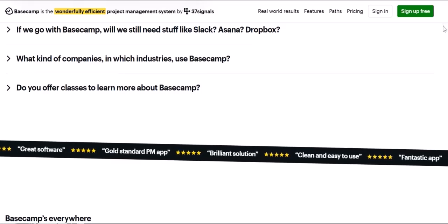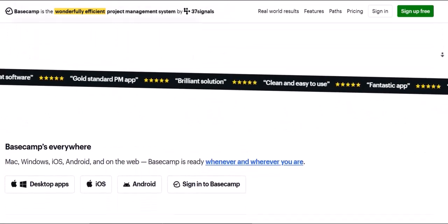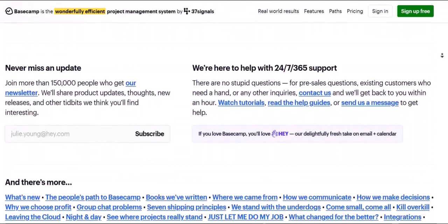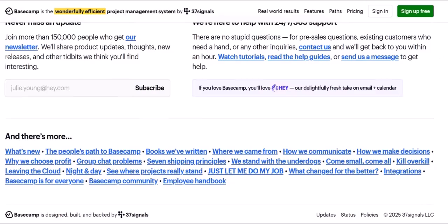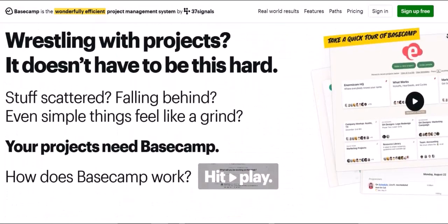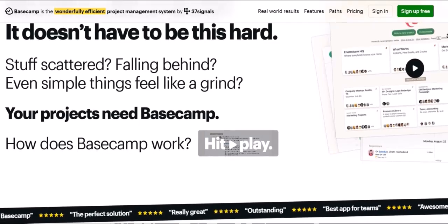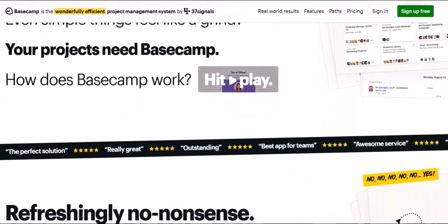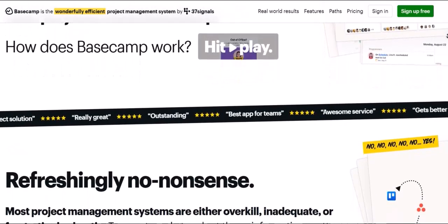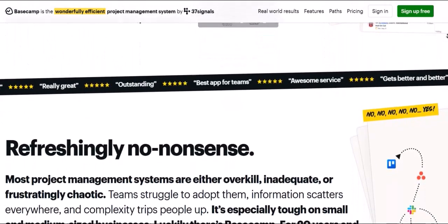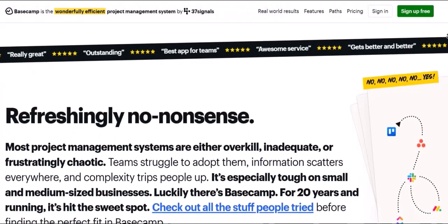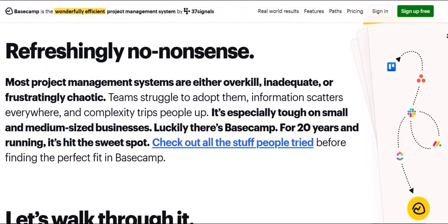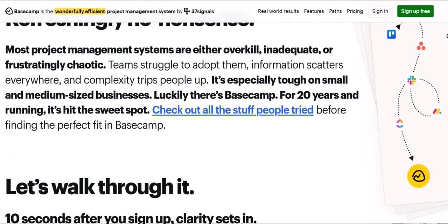Standardize assignments, optional. While you typically won't assign specific people to tasks in a template, as they'll change per project, you can assign roles if your team consistently has them. For example, assign a task to marketing lead instead of Sarah. Review dates. Ensure any dates are relative. Basecamp is smart enough to adjust dates when you create a new project from a template. If a task is due 7 days after project start, that will be maintained. Review any hard-coded dates and adjust them if necessary.